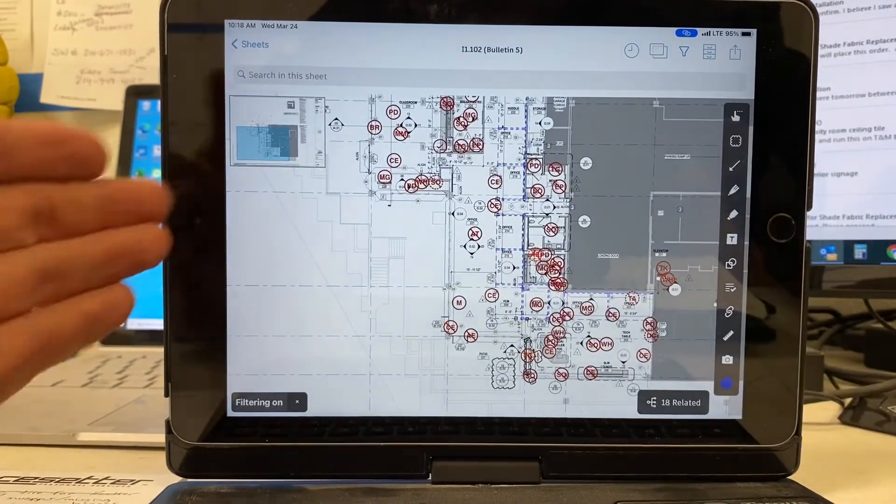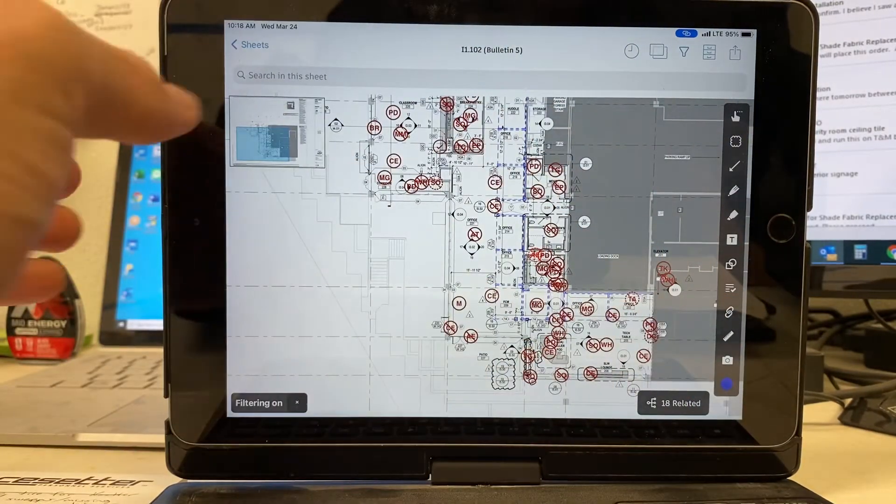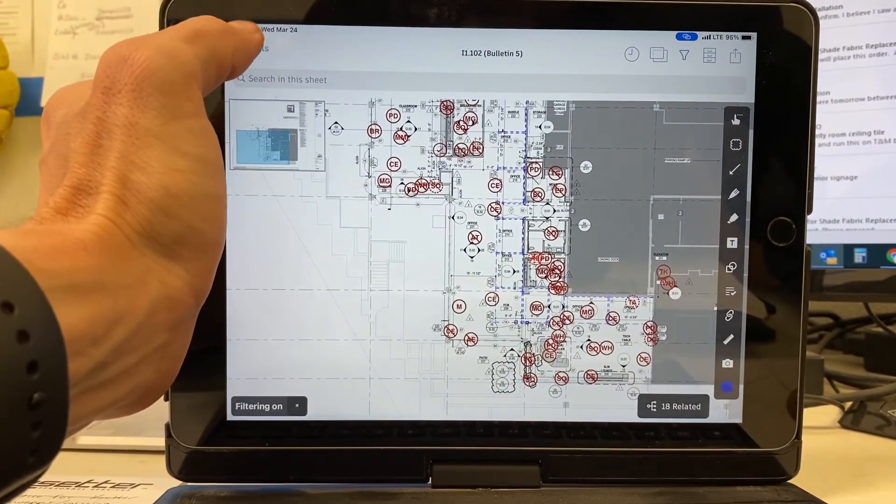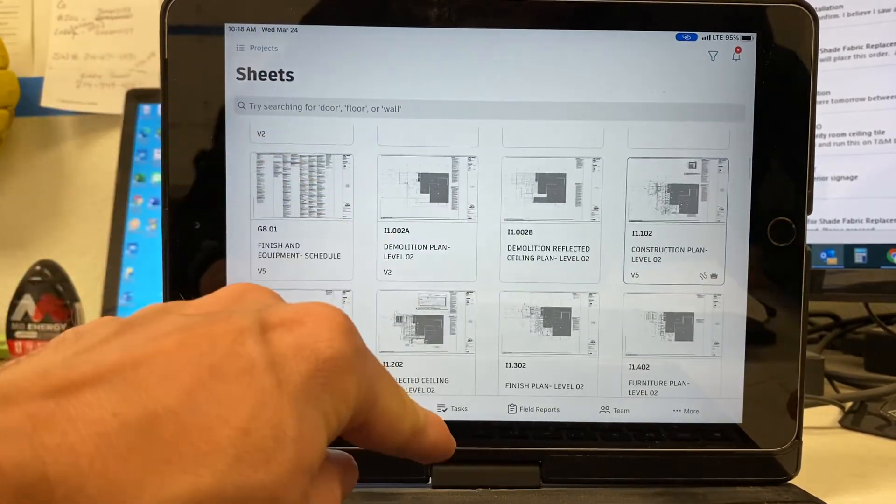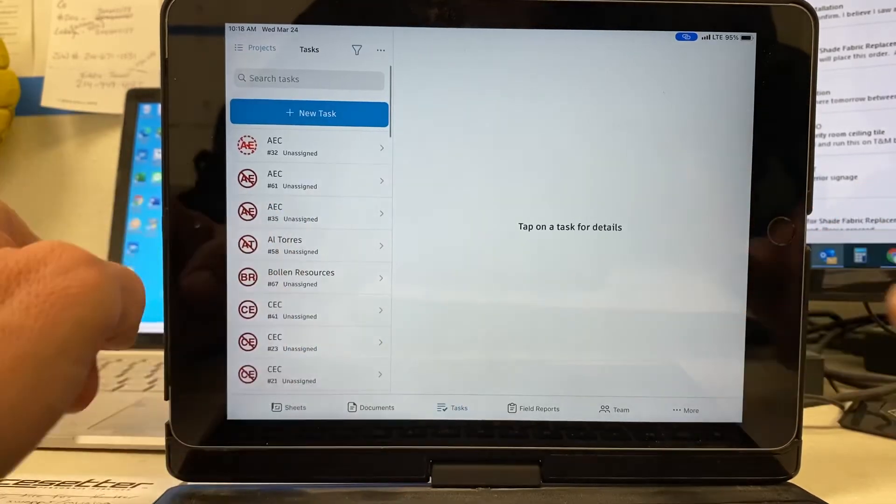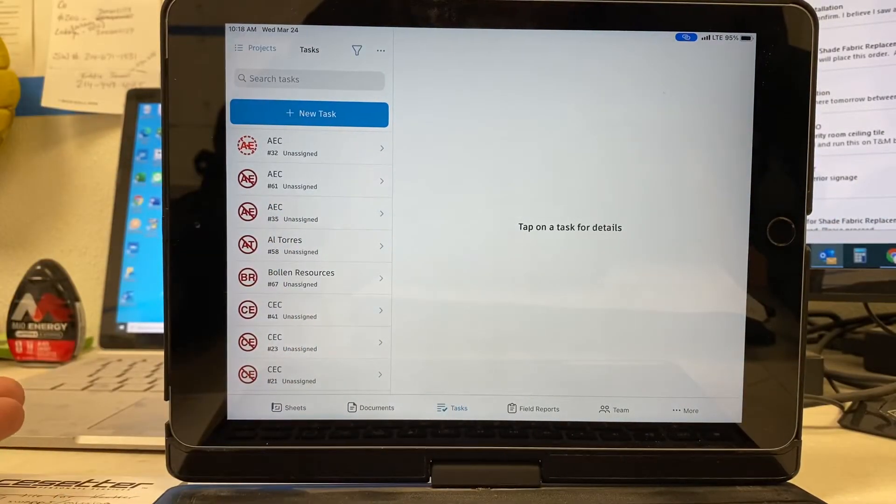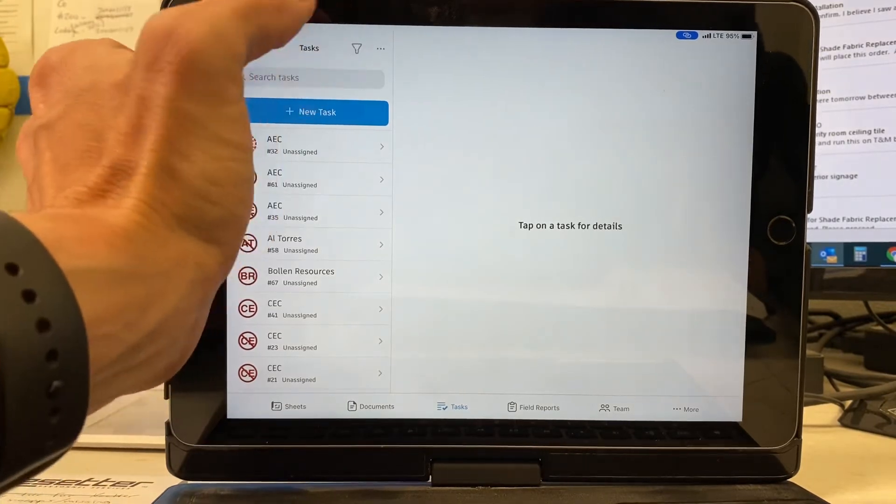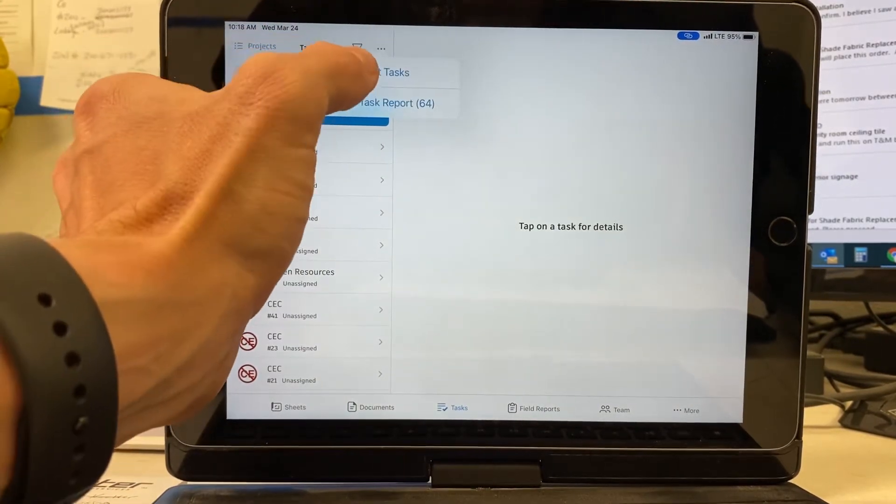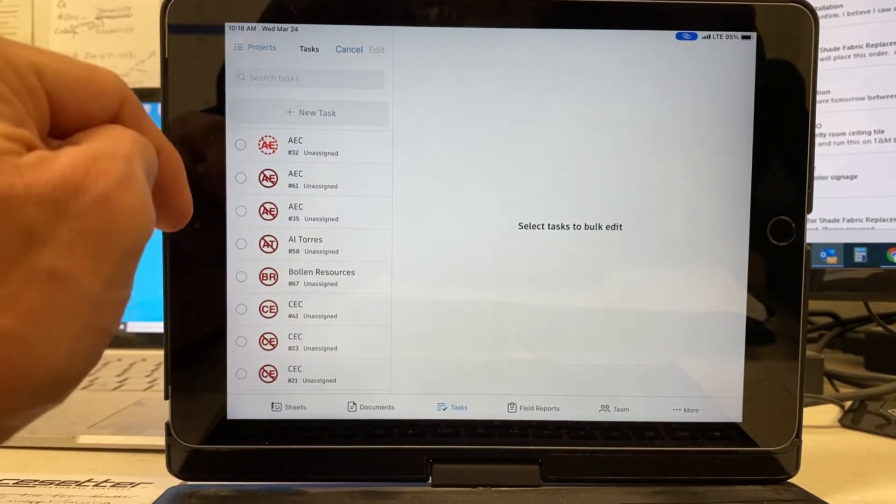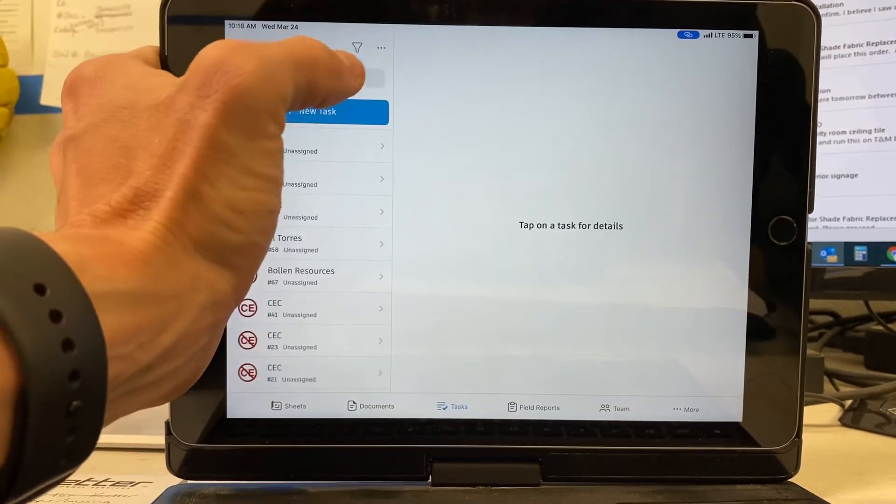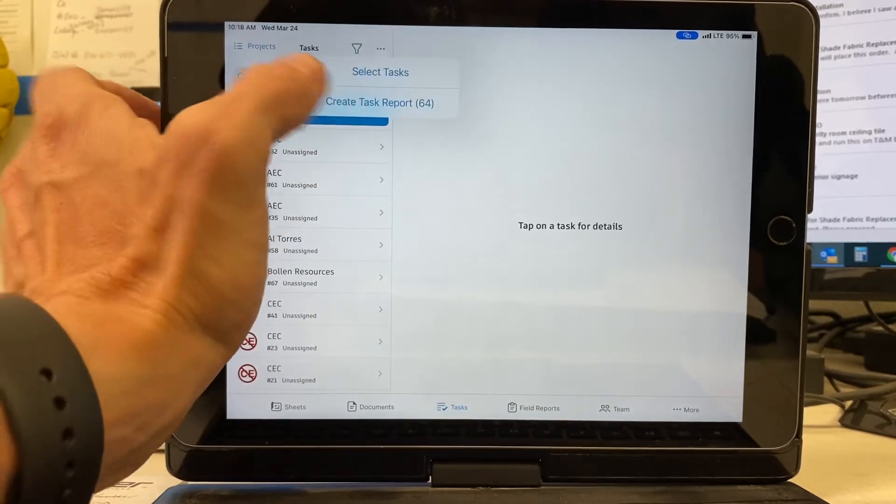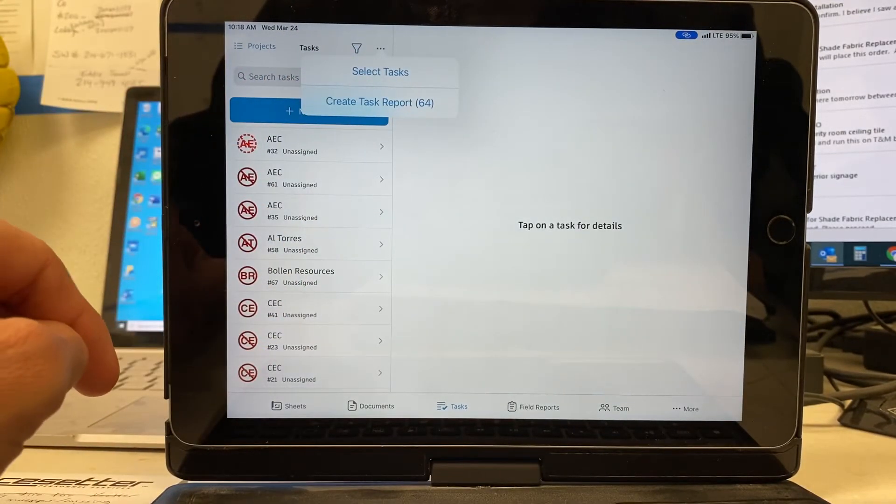Now I have all of my items. I've done them. Now, there's two ways we can do this. We want to go back and go down to tasks. I'm ready to send out my list to everybody, right? So there's a couple of ways you can do it. You can hit select tasks if you want, and you can just send it to the sub. Or you can create a task report with everything included in here.